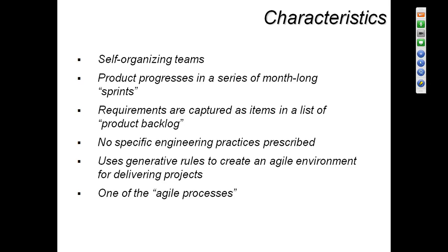Here in Scrum, work means backlog items. You may have 50 backlog items, and you cannot finish all of them in one sprint. So depending on the capacity and resources available, you will pick up 2, 3, or 5 user stories from this backlog.